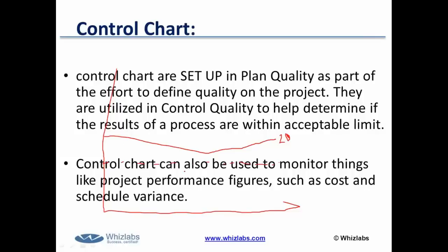Okay. Control limit is plotted by a dotted line. There is a lower control limit and an upper control limit. Suppose 20 was the mean, the initial requirement, and suppose the limits are between 19 and 22. Even if it is between 19 and 22, you don't have to bother about quality. This is called a threshold value, where you don't have to perform any corrective or preventive actions.